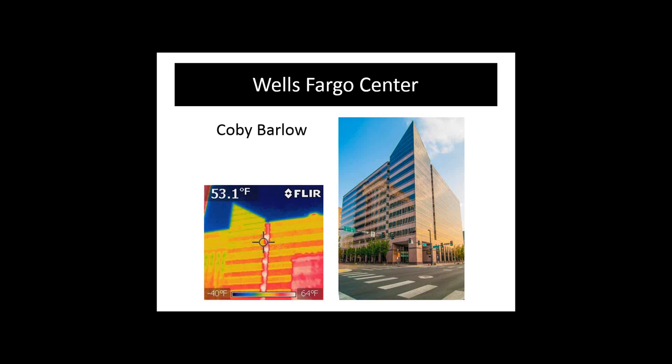The whole project, I think, is between maybe $500,000 and $550,000. And I know that Idaho Power, with all the rebates put together, could cover approximately a third of the project, which when you go to your owner and show them, well, it's a third paid for already. That's always a good boost for the ownership. It helps your return on investment.